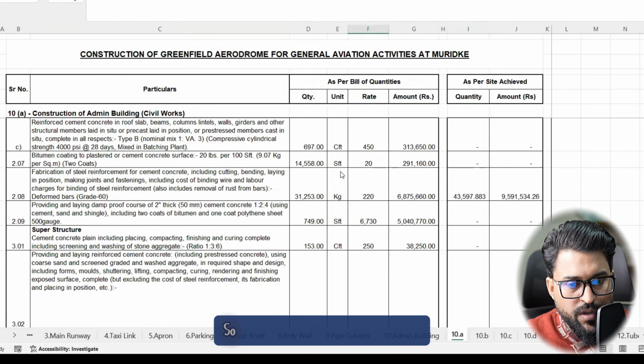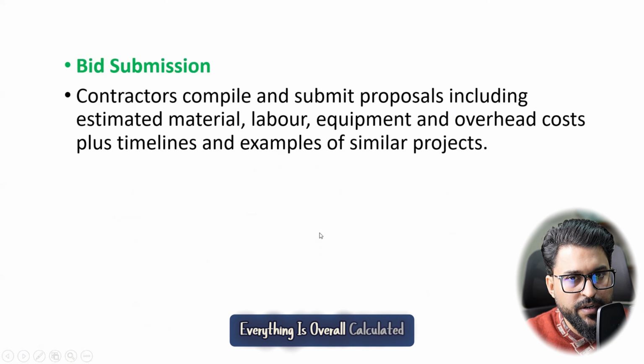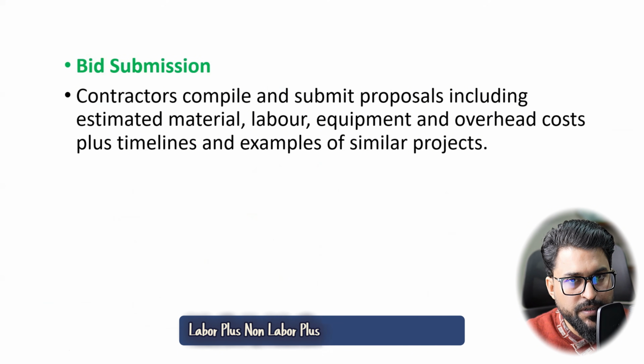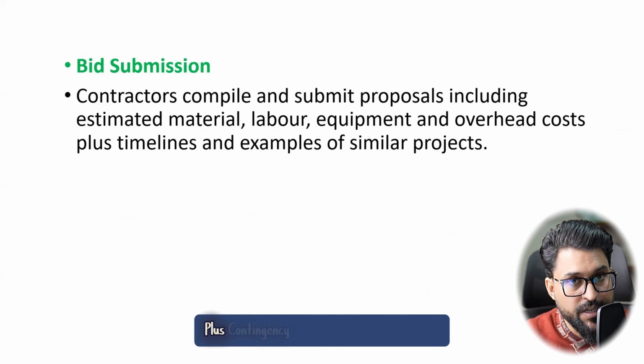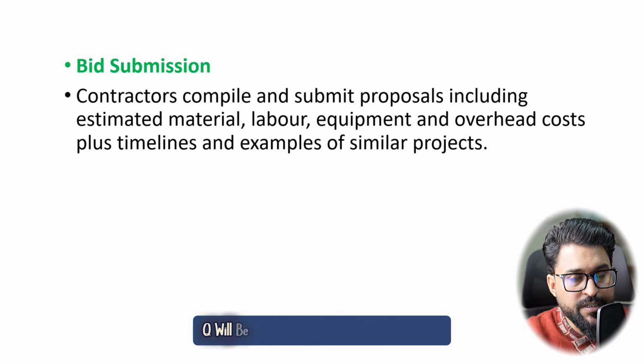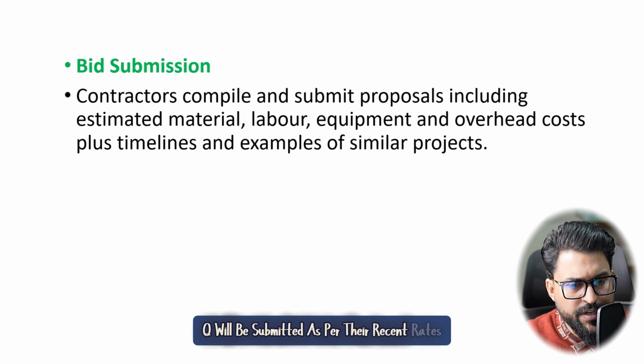In that specific unit rate, everything is overall calculated: labor plus non-labor plus material plus their profits plus contingency as well. So that kind of BOQ will be submitted as per their recent rates and all that.